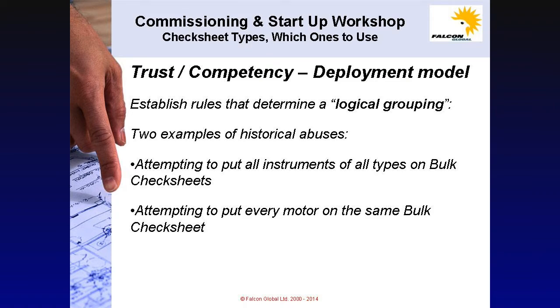As an example of recent abuses of the use of bulk check sheets, we have attempting to put all instruments of all types onto bulk check sheets, and also attempting to put every motor onto the same bulk check sheet. These are the situations we are trying to avoid.